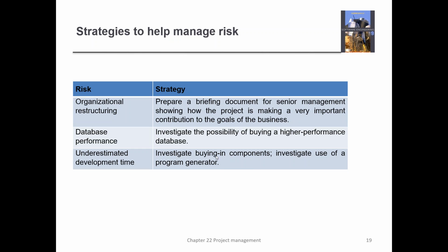So you look at the already developed components or the program generator. Again, they will cost money, but at least you know that if you must, you can. All right. And the problem with these components and the program generators is that they may not do exactly what you need them to do, but they do help.